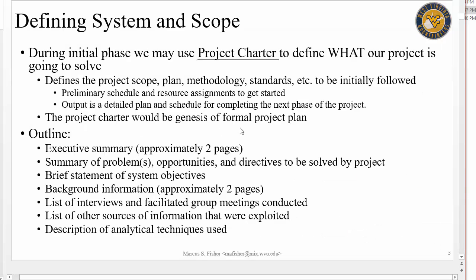We're talking about the system scope — defining the system and its scope. Some organizations and projects will start off with what's called a project charter, which is basically an agreement to get things started and get resources allocated so you can begin understanding the problem. The project charter typically contains information like the preliminary schedule — meaning how long we're going to take to understand the problem. Some projects might spend a week, some a day, some three years, depending on the type of problem.